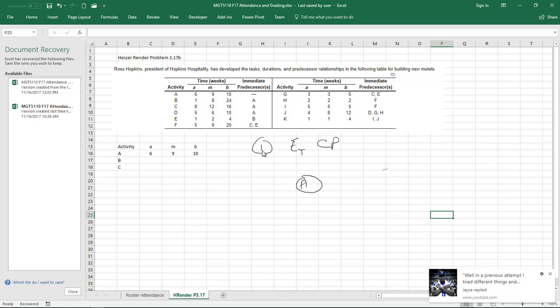Well, the first thing that we do is we calculate this expected value, expected time through, for all of these exhaustively. So the next column over here, we would type in, this is our expected time. And the next column would be the variance here. So the first thing we're going to do is calculate all the expected times of all these numbers.